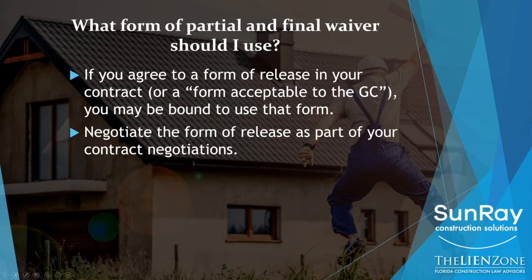You should negotiate the form of release as part of your contract negotiations. When you're reviewing the contract, when they give it to you, don't just look at the scope and the price and the schedule. You need to look at all of the legal terms and the exhibits, including the forms of releases that you're going to be asked to sign every time you get a check.